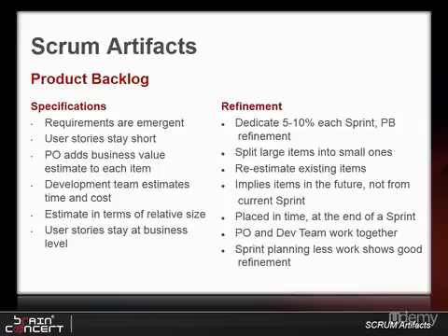The team is normally better suited to figure out how to solve something, so the product owner should focus on business goals. When I see technically oriented stories like this, I normally ask the product owner a series of questions like, "But why?" until we find the underlying goal. Then we rephrase the story in terms of the underlying goal: "Speed up the search event form in the back office." The original technical description ends up as a note: "Indexing the event table might solve this."